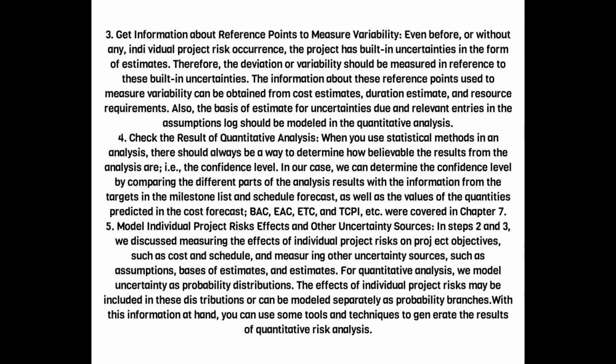4. Check the result of quantitative analysis. When you use statistical methods in an analysis, there should always be a way to determine how believable the results from the analysis are, i.e., the confidence level. In our case, we can determine the confidence level by comparing the different parts of the analysis results with the information from the targets in the milestone list and schedule forecast, as well as the values of the quantities predicted in the cost forecast, BAC, EAC, ETC, and TCPI, etc., were covered in Chapter 7.